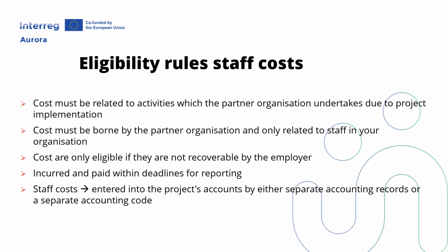The costs must be incurred in the partner organization and only related to your staff in your organization. So, the persons you report costs for under this cost category must be employed in the partner organization. Costs are only eligible if they are not recoverable by the employer.